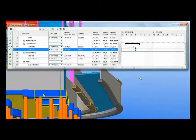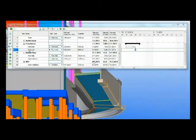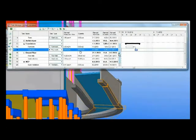Now you watch how we place it in. You can see in here that the quantity has increased, and that quantity is exactly the same amount that we put into here with these sloping and curving strip footings. Good luck measuring that with a ruler, by the way. And same on the other side. Watch it again. Watch the quantity as it increases. There you go, 22 cubic meters of concrete gone in there.